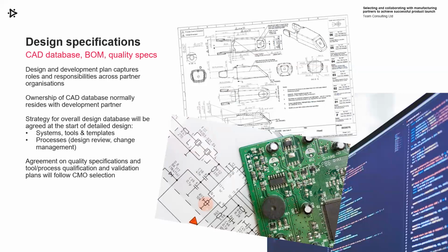Ownership of the CAD database would normally reside with a development partner. They can handle that development, they can handle the development of the 3D, 2D, and then hand that over during design transfer as appropriate. You do want to agree the strategy for that database though at the start of detailed design, so what kind of CAD, what tools, what templates, what processes for things like design review, change control, change management, etc. You want to make sure you know how you're going to handle those, how you're going to handle software code, how you're going to handle electronics, PCB designs.